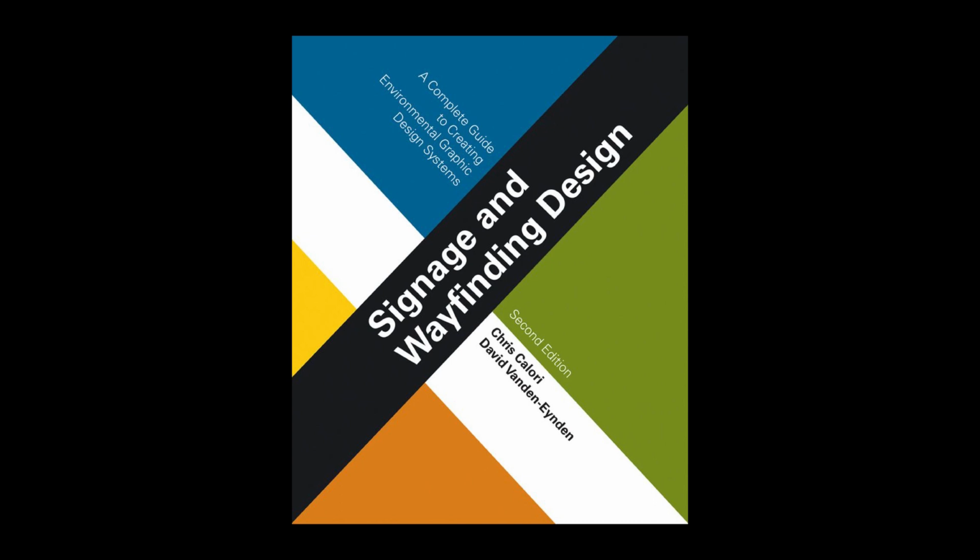The sign message schedule is the master inventory list for the entire program, which is why it is updated and finalized during Phase 4 with all changes, additions, and deletions to sign messages and sign type/numbers. Sign or location number and perhaps type changes must also be updated on the final sign location plans.